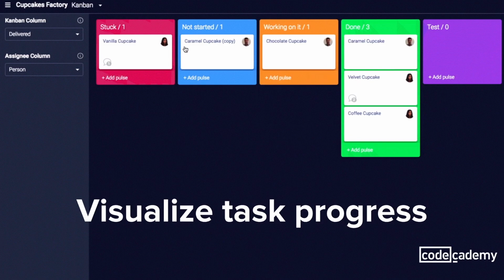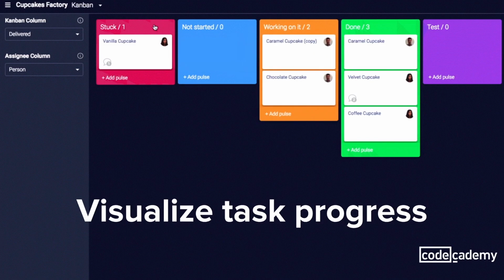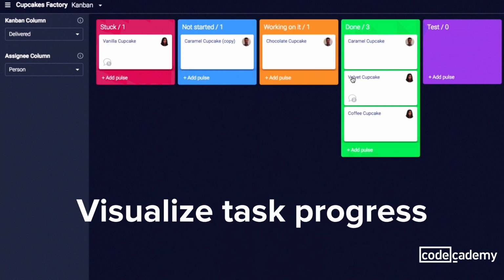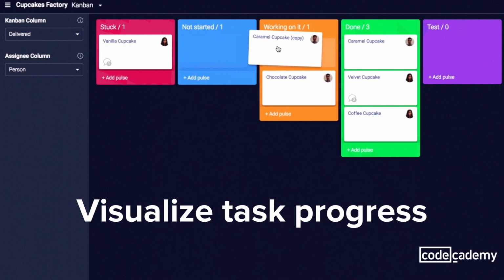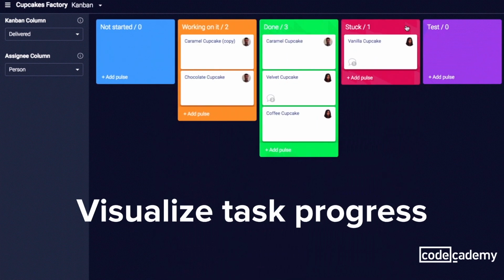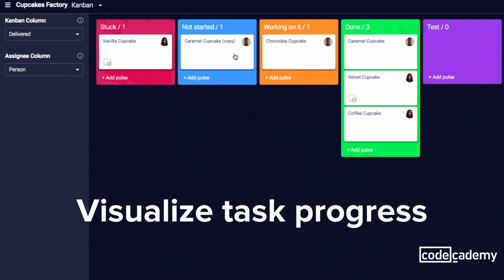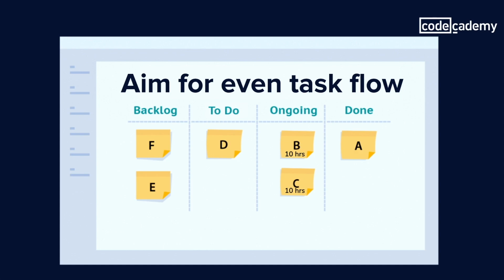When tasks progress through the board, you'll have a visual representation of their journey through the board. This allows the team to analyze the stages where the tasks are being held the longest and understand what causes them from progressing to the next stage. Ideally, you'll want to refine the process so that the tasks evenly flow from start to finish. This will allow the team to be able to accurately estimate how long tasks will take and communicate to stakeholders when to expect a feature to be ready.